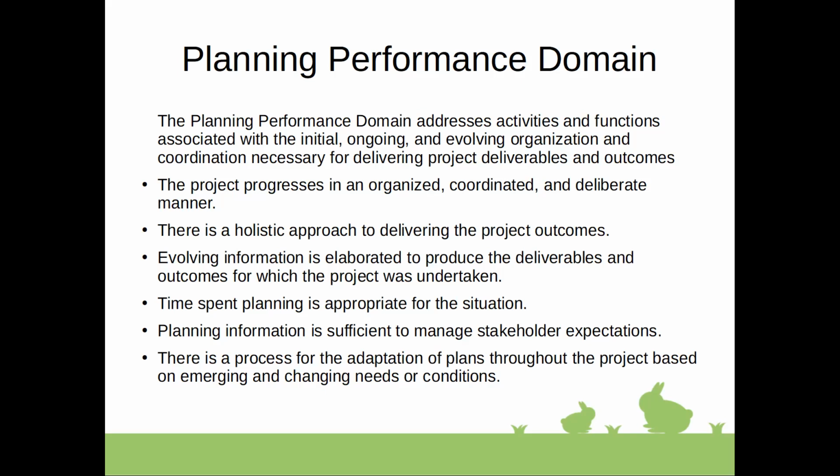Some projects need plan change, but in order to understand if there is such a need, you either define explicit waypoints where you do deliberate review of the project execution and project plan and make adjustments through change management, or you make decisions that no change is needed. So basically you need to have very deliberate approach to the change management.